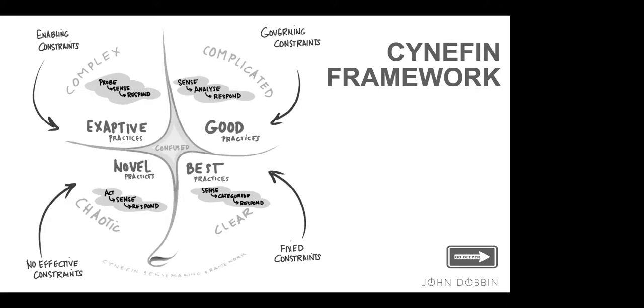And so even within the complex domain, even in the Agile domain, they should be able to determine whether a particular application suits a framework like Scrum, or whether it is much more of a continuous adaptation process like DevOps, and they use a Kanban type of process,